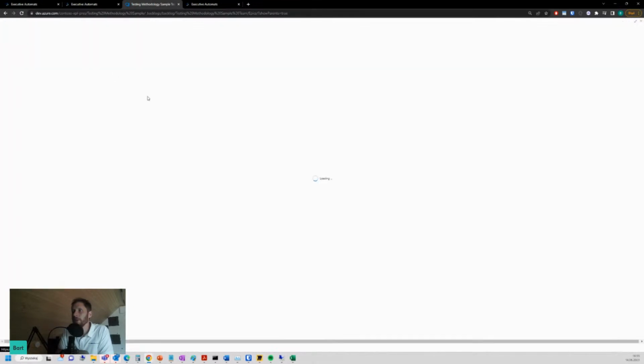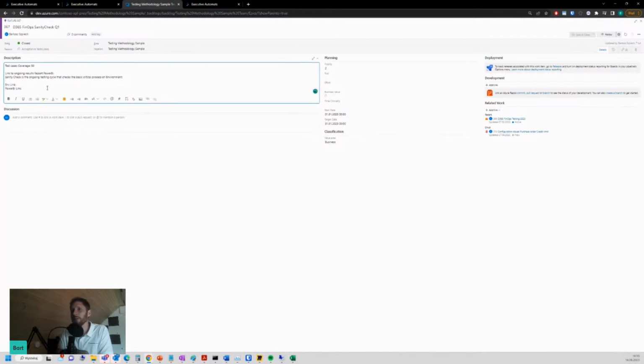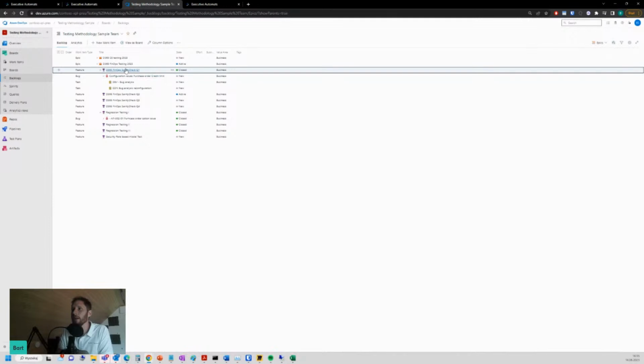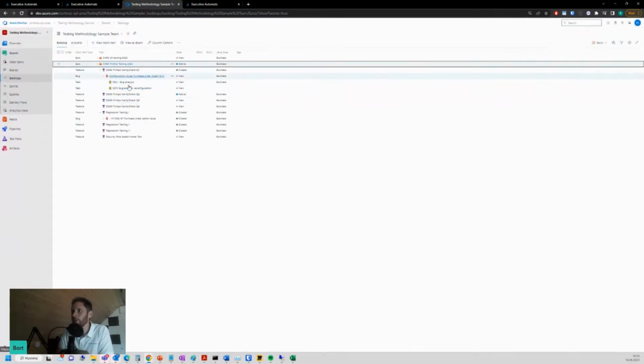underneath the feature. Underneath the feature, you also have a description of the environment which is tested, and a Power BI link where stakeholders can go for verification. On the epic level, you can set up more information regarding the people responsible, like a RACI matrix, and having that helps you be proactive. If something happens, in triage, you know who to go to, where to ask, who will help you with